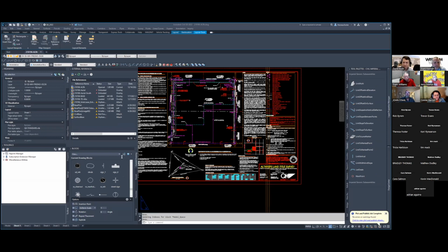We do what we call field survey instructions. You'll see it's a big task. This was for a big solar project we did about a year and a half ago. We actually tell them what we're going to look for on the boundaries, what field targets for our UAV, what field topo they're going to take, and then when they're out there doing the UAV tasks, what they're going to be looking for. So it's a pretty extensive list.